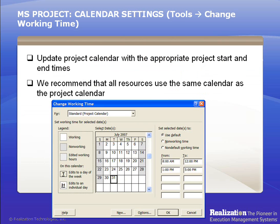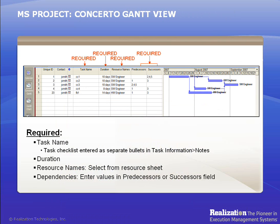Concerto also allows setting custom calendars for both project and individual resource calendars. You can specify company holidays, working hours, a resource's non-working days, or non-default working time. Concerto Critical Chain will take all calendar information into account when calculating a task's start and finish time. Now, we'll use the Concerto Gantt view in Microsoft Project to create the project network.